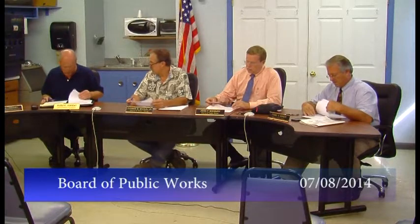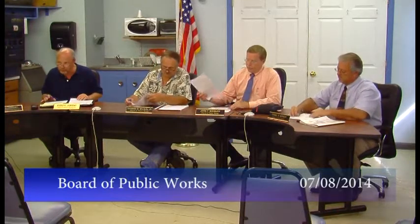And at this time, we'll be taking the superintendent's report. I'm going to spend the first part of my presentation talking about Elm Street because there's a lot of moving parts on Elm Street. As board members have probably seen, Palmer Paving has been starting to work on the southern section of Elm Street on structure adjustment this week. They were on site yesterday. They're going to continue working on structure adjustment through the end of this week.